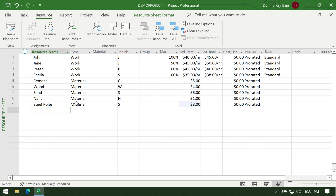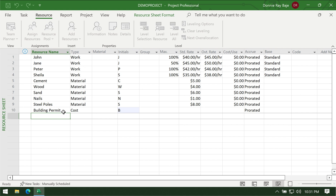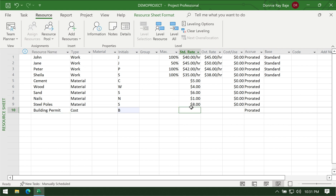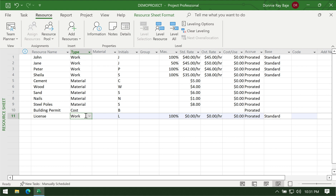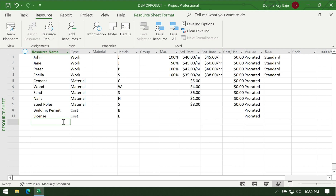The third type of resource is the cost resource. The cost resource pertains to items that are neither work nor materials — they are usually one-time things whose price can vary per usage. This could be building permits: they're not material, not work, and they can vary per project. That is why you cannot assign a fixed price here; you will assign it later per task. We also need to pay some licenses — that's a cost resource. This also includes taxes, which can vary from project to project.